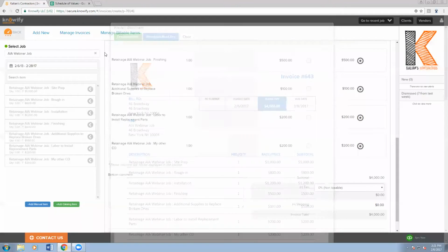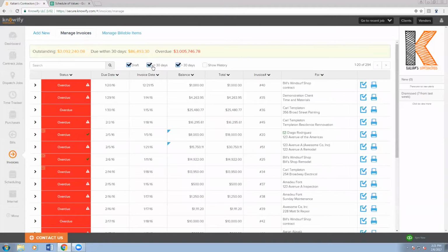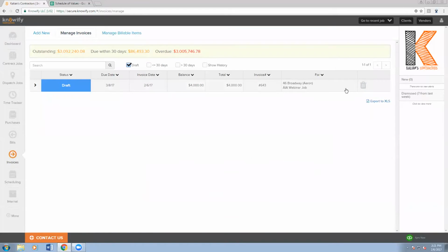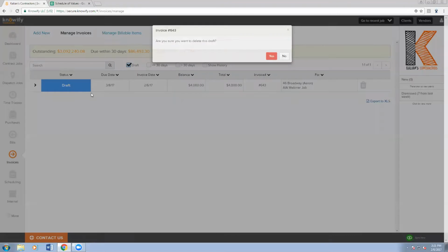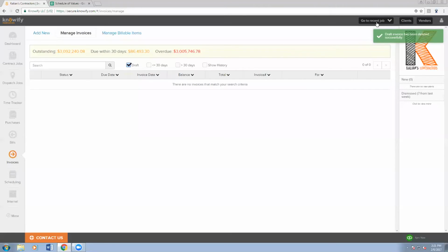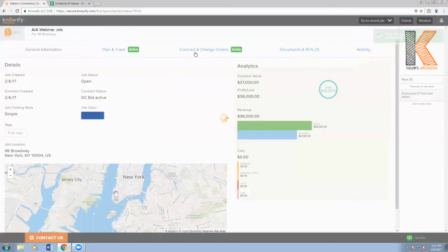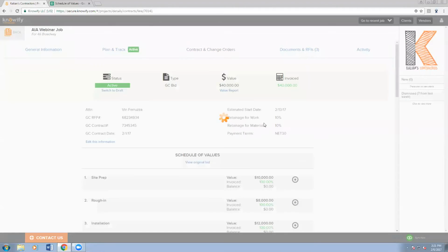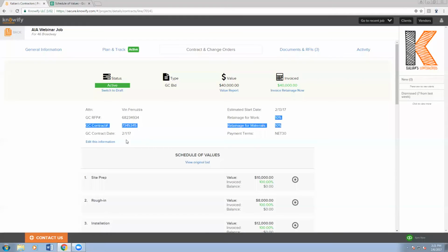That being said, we do often hear requests from people who want to use the AIA rec even though they are invoicing retainage, and we actually have a way that you can do that as well. So if I still need to see that same SOV layout, but I want to invoice all of my retainage, I can come in here and I can adjust what my retainage values are. Like if I want to adjust these, let's say I want to invoice all of it, I'll invoice 0%.